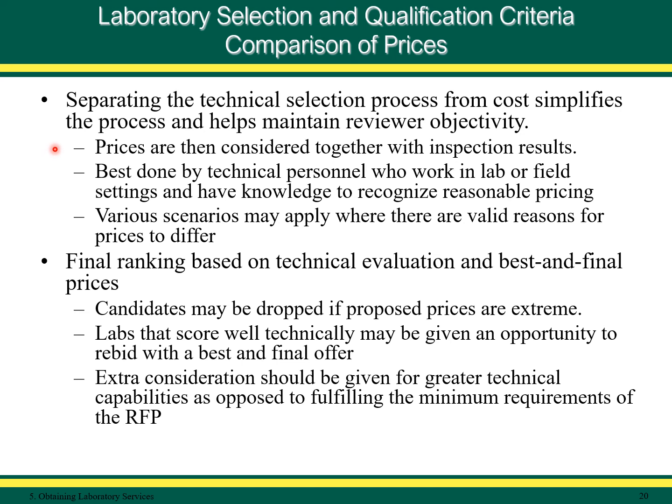Now prices can be reviewed and considered together with inspection results. This process is generally best performed by technical personnel, including members of the Technical Evaluation Committee who work either in a laboratory or in the field setting and possess a knowledge to recognize a price that is reasonable for a given type of analysis.